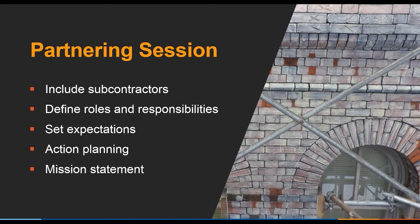The way masonry work started was the conservator would actually take a piece of chalk and identify a piece of masonry that required restoration work or had to be removed and replaced. After that was done, it was followed by an AFG representative and somebody from Grunley to quantify the amount for billing purposes, and then the masons would follow behind to make sure they agreed with everything so they were appropriately compensated.